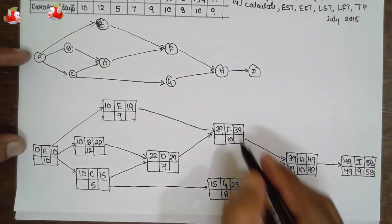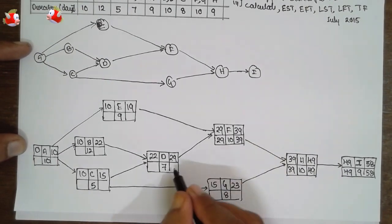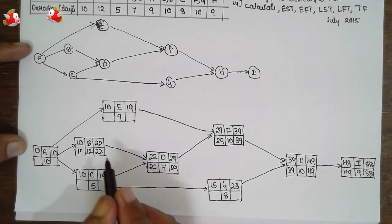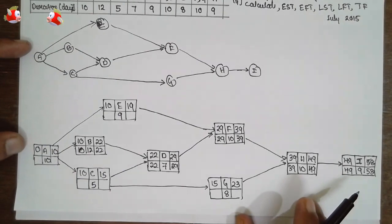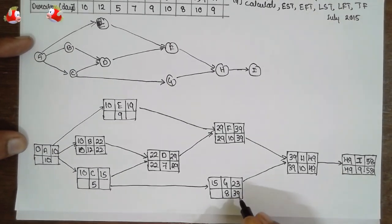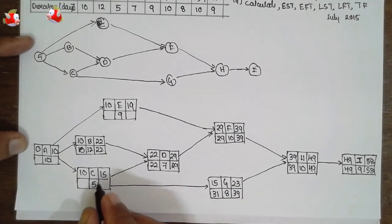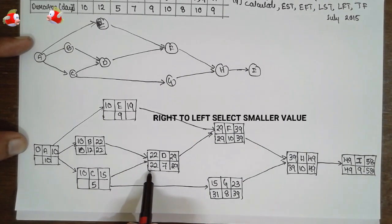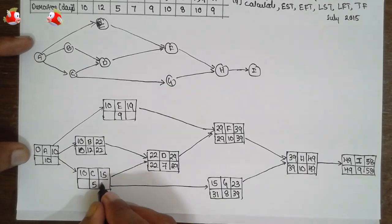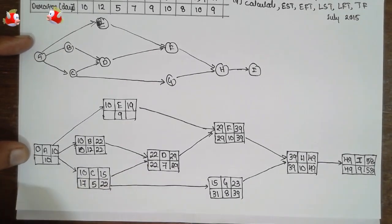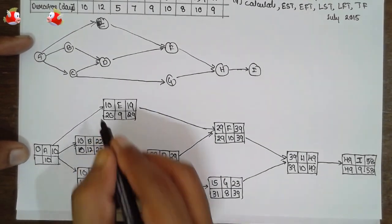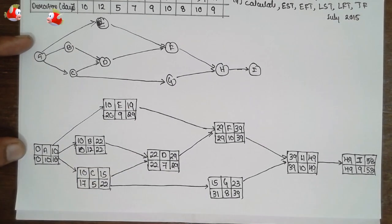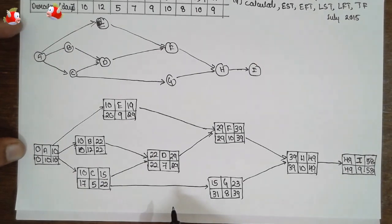Now move the 58 here. 58 minus 9, 49. Move 49 here. 49 minus 10, 39. First I will complete the critical part. See the 39, 39. Write 39 here. 39 minus 10, 29. Move 29 here. 29 minus 7, 22. Move 22 here. Now wait here. This is a junction here. As we move from left to right, we have to select the smallest one. 22 is the smallest. Therefore you have to consider 22 here. 22 minus 5, 17.